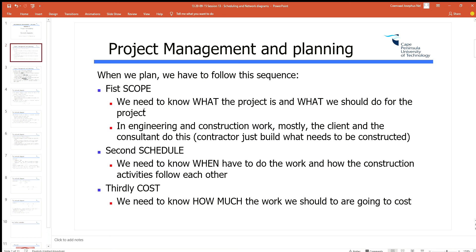When we plan, we have three basic components: first we need to scope, second we need to schedule, and third we need to cost. In the scoping process we figure out what we need to do. In the construction and engineering industry — the client, consultant, and contractor triangle — scoping normally sits between the client and consulting engineer. They put that out as a tender, which says what needs to be done, and the contractor figures out how to sequence it. So today we're talking about the schedule — the sequencing of those activities.